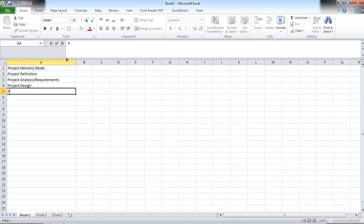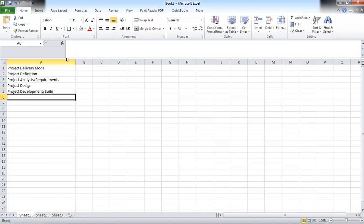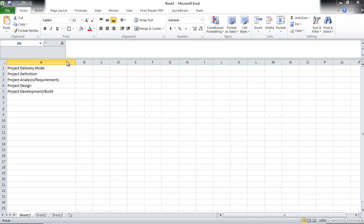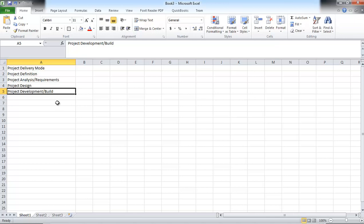Once we designed it, we look at the project development and build, and this is where we build actual product. So let's say that we're building a server. We've talked and looked at our example, we are replacing and upgrading our computer box and we need to bring in a new one. So this is where we actually gonna go, we're gonna purchase it, we're gonna deliver it, we're gonna install it, we're gonna migrate existing files, we're gonna set up security permissions. We're gonna do a lot of these things, and that's where a detailed plan comes in. Here at this point we're just looking at the high level, but I'm just showing you the differences between high level and the low level. So in high level we just say development and build. In the detail planner we'll list all of these activities I just mentioned.